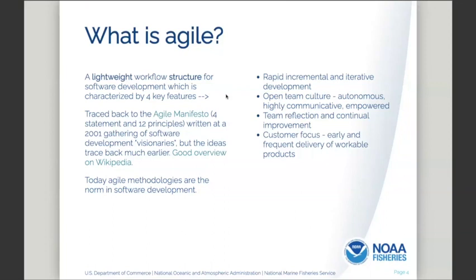And the key elements within Agile are rapid, like a week, 2-week cycles of development. So it's not like we're going a year and then we kind of reflect back on how much progress we made and how we're doing. No. This is like a week, or now my friends tell me in software development, the standard is like a 2-week cycle.